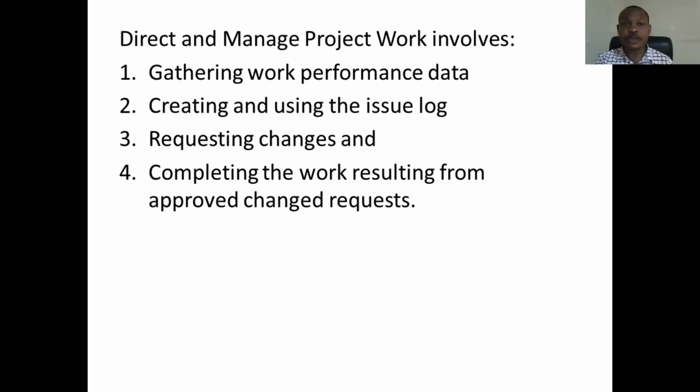But the essence of the change control board is to look at the changes and then go back to the baseline. When I say the baseline, I'm talking about the approved, signed limits that have been placed on the project, generally agreed by the stakeholders. That is the baseline, meaning you can't just change it. That's why it's called the baseline. You can't just change the cost. You can't just change the schedule. You can't just change the quality requirements. For you to change it, you have to come to the table. And on that table, everyone will have to be in the know as regards the new change you're trying to introduce. So that is performing integrated change control.